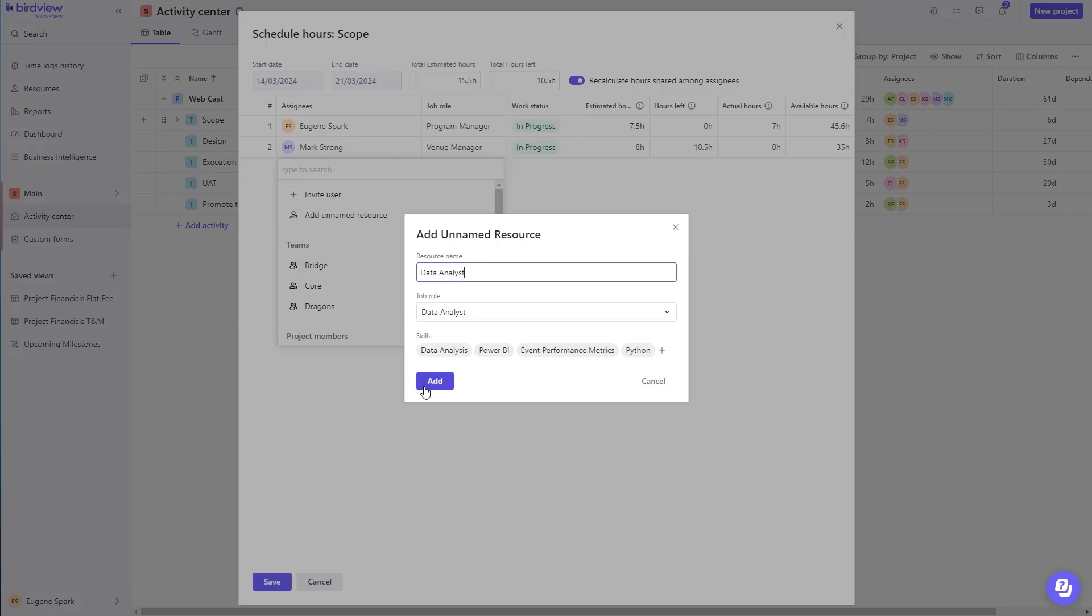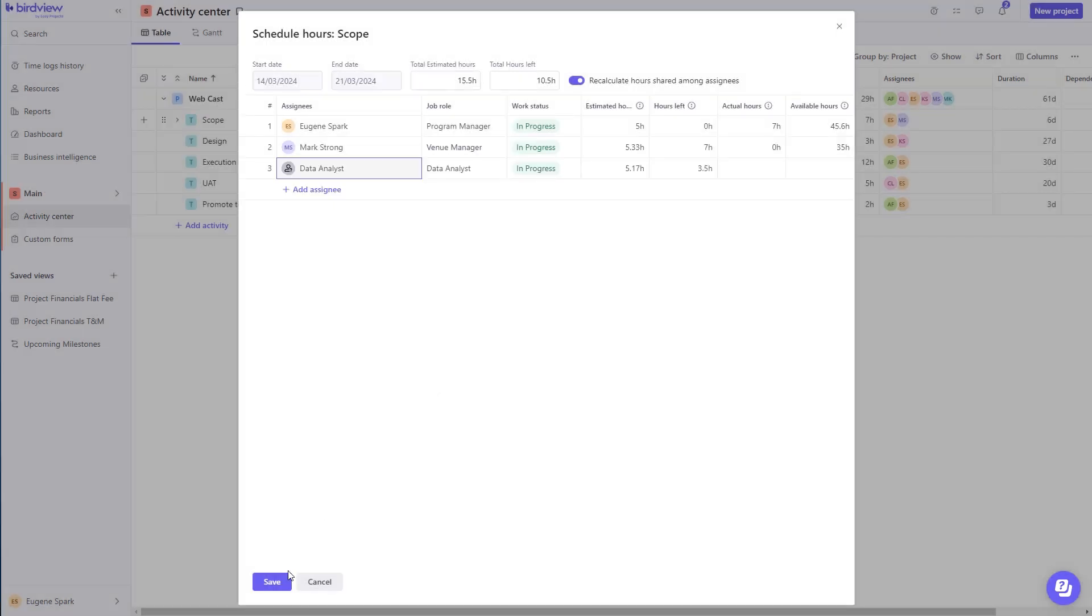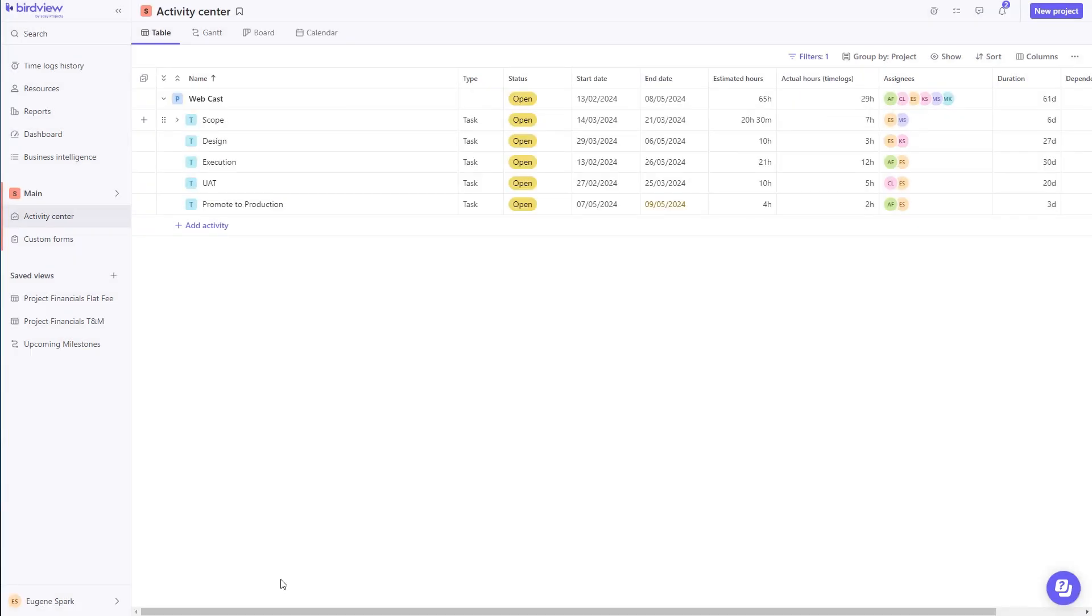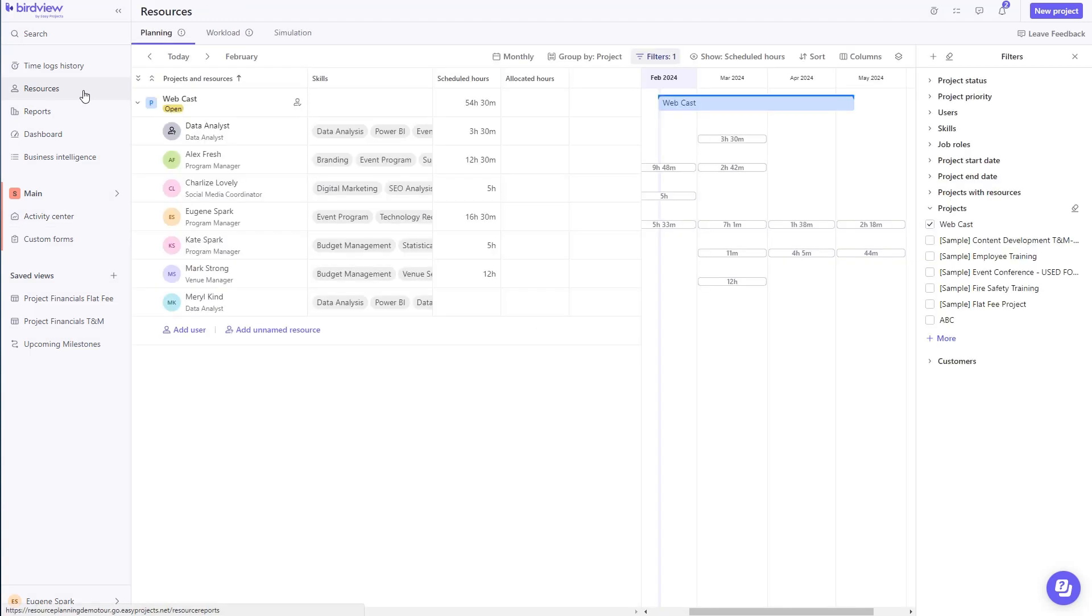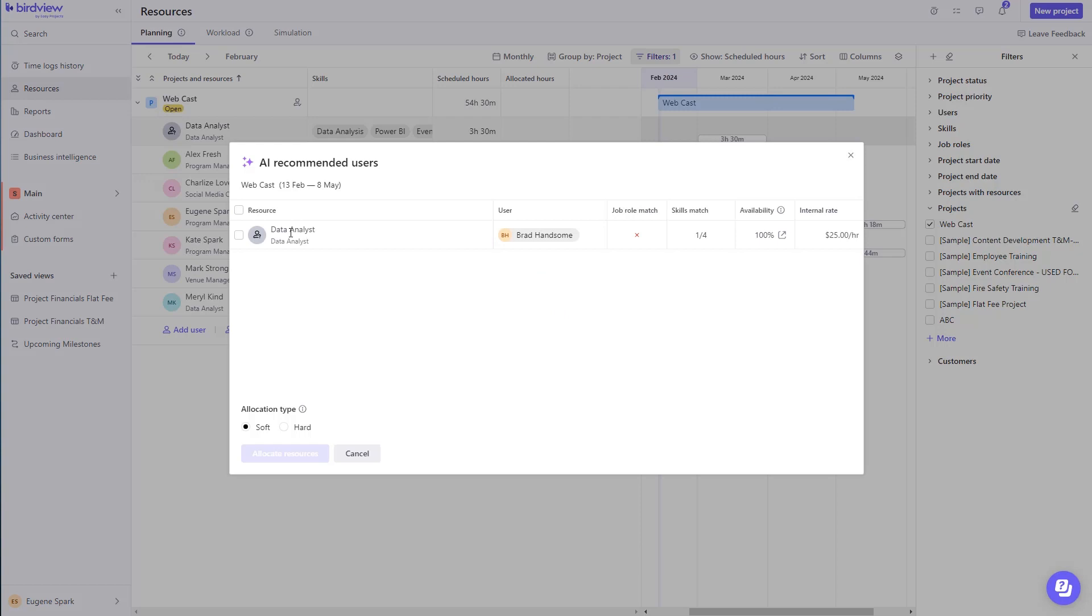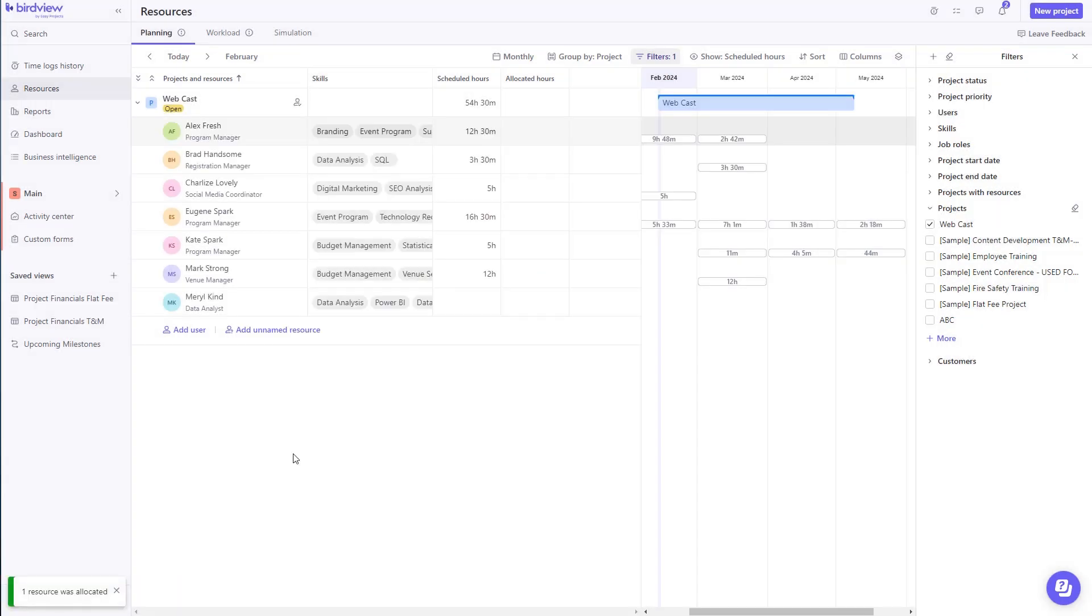Remember, not sure which resource is going to be available to take on a specific task? Use the unnamed resource option to assign the task by creating a placeholder. Then, swap it with an available resource using AI.